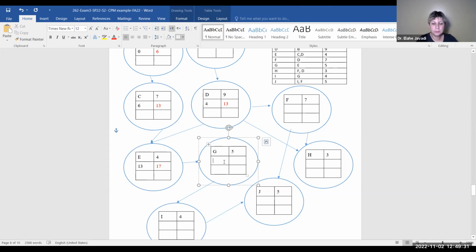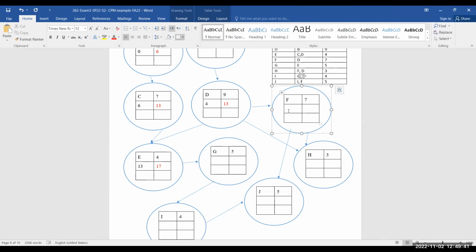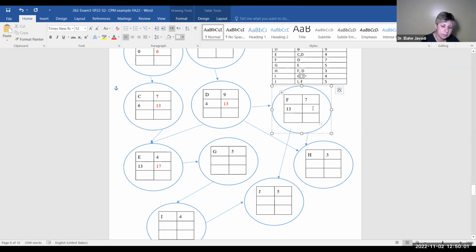Greg, it's you, and it's G. No, it's F. I'm sorry. Maybe we can come back to you for G. It's F, Greg. Can you hear me, by the way? Yes, I can. Would it be 13 since it relies on D, since that's D's early finish? Exactly. F depends on D only. D finishes on 13. If there is only one, you get their early finish. Perfect. 13 plus 7, 20. Good job, Greg.